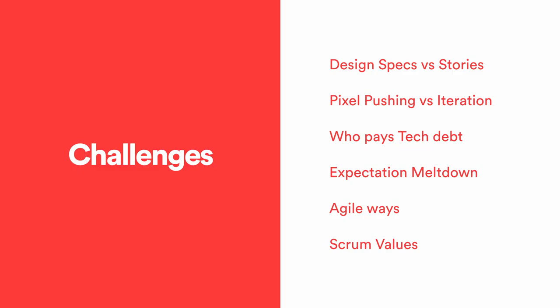So when it got to sprint five and we had that talk, their feedback was that had they known that, they would have done things a little bit differently. They were expecting that the team committed to this piece of functionality, but it doesn't look exactly like the design. So it was like, well, we're not committing to making it look exactly like the design. We're committing to it working like the functionality that the design is talking about. If I were to do anything better on my next one, it would be to cover that base.